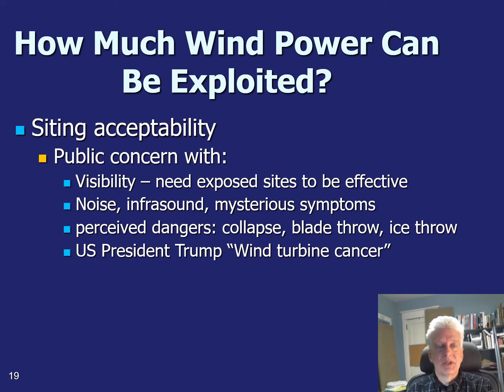After you screen sites for which ones are completely excluded, then you also have to work through planning processes from municipal and provincial governments that have the power to say whether land can be zoned for a given usage, to give you permission to do this, as well as having permission to connect to the power grid. So when you're putting wind turbines where people can see them, you can't put them in valleys just because they're less visible, there's no wind in the valley. You have to put them on the hillside where everyone can see it.